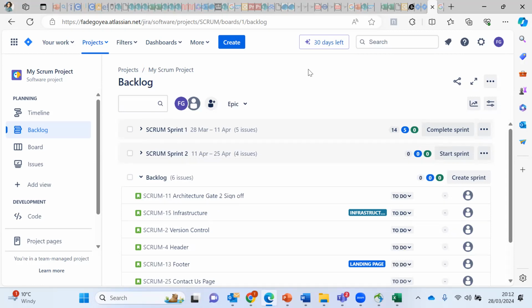For the first question, it is not your Jira board or your Azure board that will determine the length of your sprint. Okay? You're working on a project, and the organization or the business, or as a team, you've looked at the project and the outcome, because deciding the length of your sprint sometimes also depends on the complexity of your project. So you've agreed, or it's been decided, that it will be a 2-weekly sprint. When you're starting your sprint, you configure your board and start your sprint as a 2-weekly sprint.